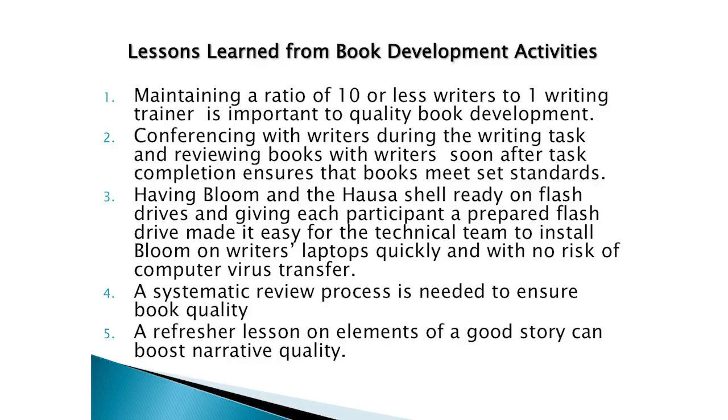So these are the lessons we learned from the activities. The need to maintain a 10 or less writer ratio for one writing trainer is important if the quality of book development is to be enhanced. Secondly, we realized that conferencing with writers during the writing process and reviewing the books with writers soon after the task is completed ensures the books meet set standards. So these are lessons we learned in the first workshop, and we implemented them in our subsequent workshops.